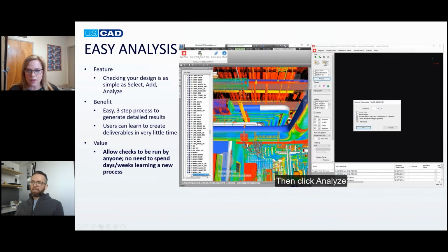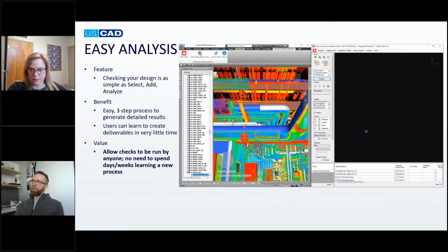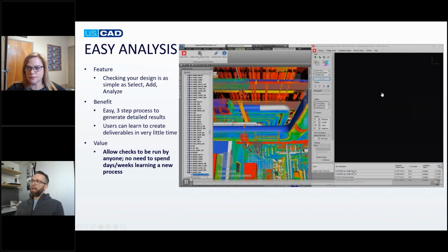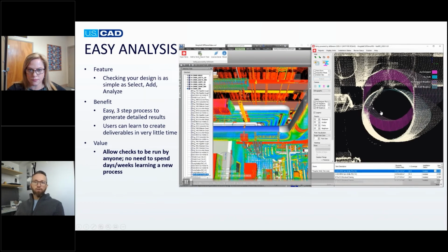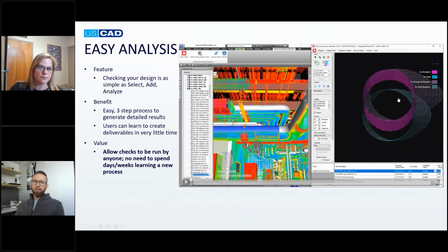Yeah, and in this scenario, I think it's actually spitting out progress monitoring in real time, showing us what's installed versus not installed. And what they just did is set a tolerance that says, show me everywhere that we have content that is out of a certain tolerance that I've specified. And you can do that by item set or work type. So in this scenario, this is showing a plumbing discrepancy where this plumbing line was installed, but potentially installed out of tolerance. Correct.